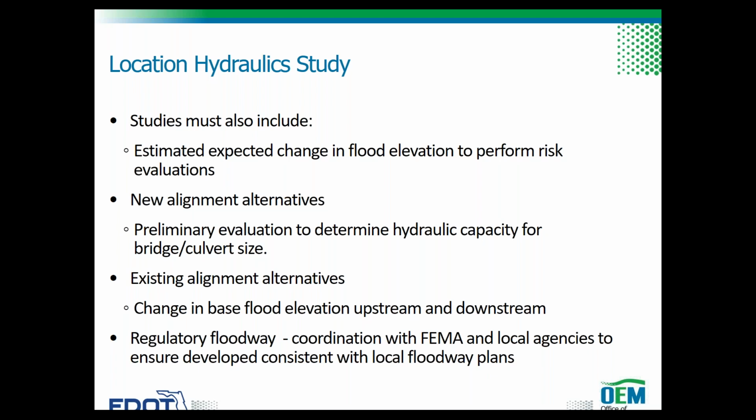The location hydraulics study should evaluate the impacts of each encroachment, and impacts on natural floodplain values must be evaluated. After evaluating the impacts to the floodplain, a statement explaining the significance of any encroachments will be included in the location hydraulics report for each type of construction activity in a floodplain.